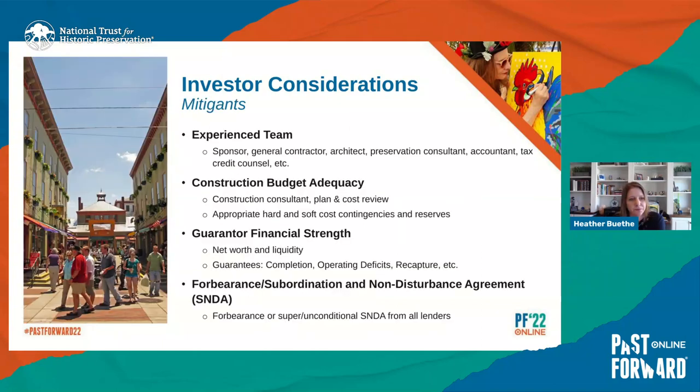Go to the next slide. So some of the mitigants that are put in place here, obviously having an experienced team on all fronts really helps with the underwriting and the comfort level. Having a sponsor who's done a historic deal before is always nice, certainly not a requirement, but surrounding themselves by a general contractor, an architect, a preservation consultant that has done these things before is helpful. And we also talked about having accountants and tax credit counsel that have experience. From a construction budget perspective, we typically engage a construction consultant to take a look at the plan and review the costs and just make sure that it seems doable for the budget that's out there.